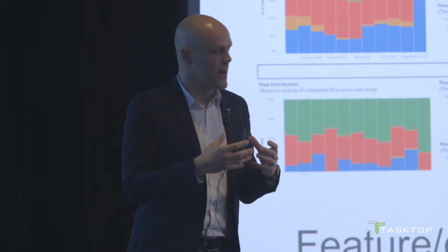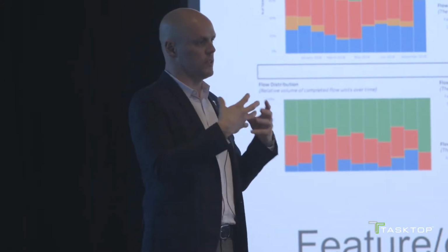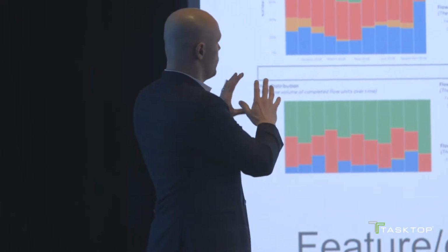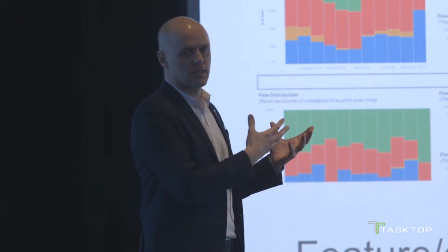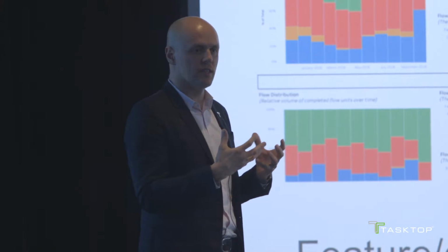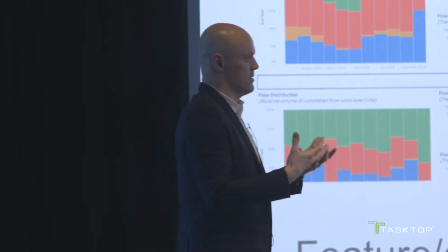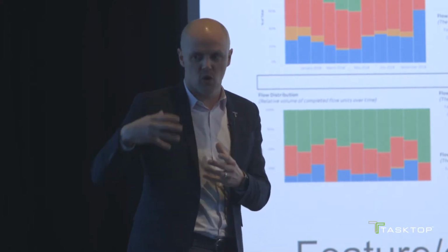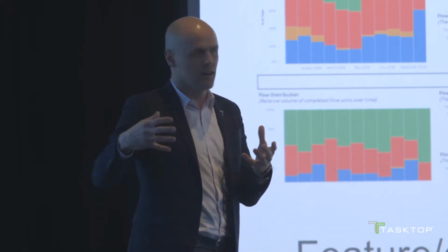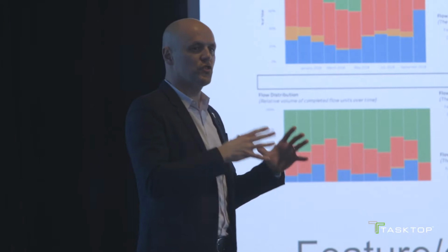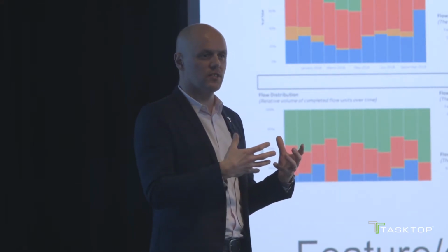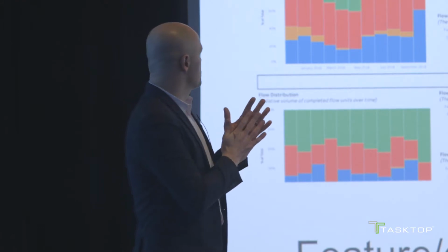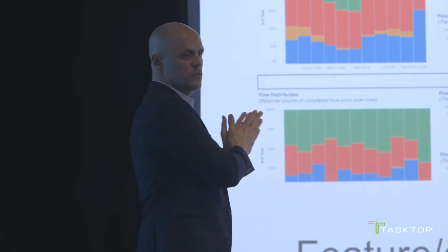And if we don't have that slack, whether it's for unplanned work or because things are getting bigger and so on, estimation's never perfect, I could now actually see that this was the effect, and we had to do things differently. Because this intuition that I think a lot of us have, that the more we utilize resources, the more we get out, is actually wrong if you're scaling production. And not only do the theories behind Dominika's book and Reinertsen's book say this, it's now possible for you to see it.